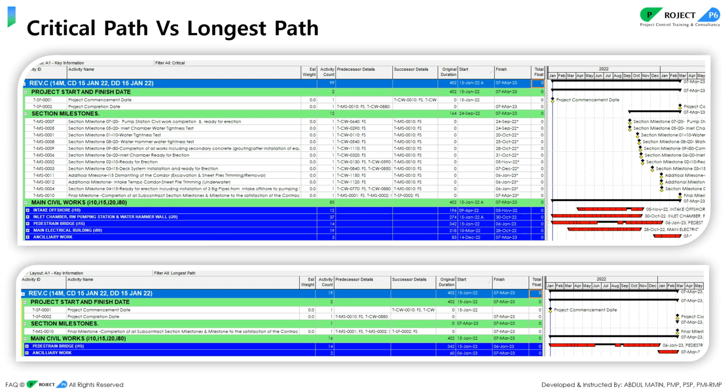Because the critical path is with some limited tasks, not all the areas will be on the critical path. Why? Because you see the dates here, the date we have observed in the contract is the same date. And you see here the star marks mean you have put the constraint here, finish on or before. So all these area milestones should be finished on or before this date, and this is driving the areas to be on the critical path.